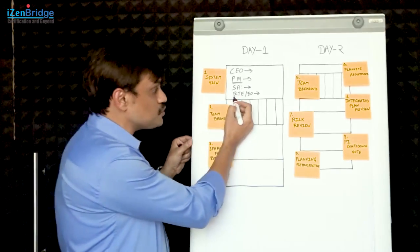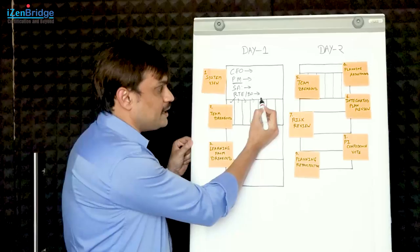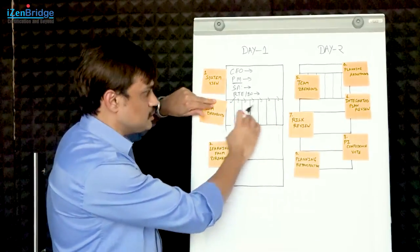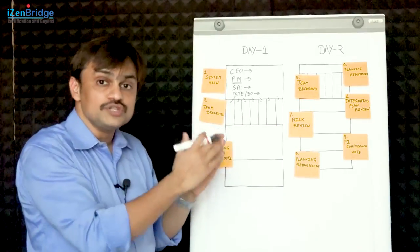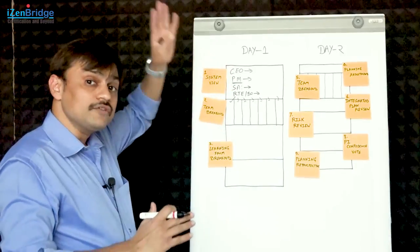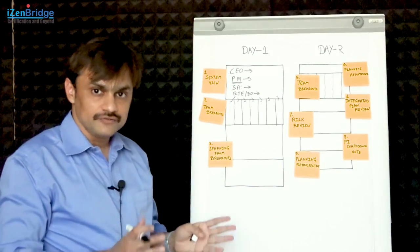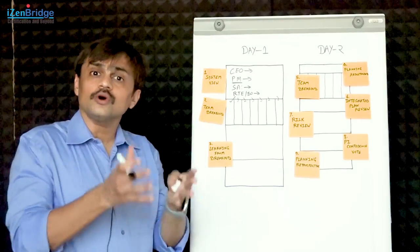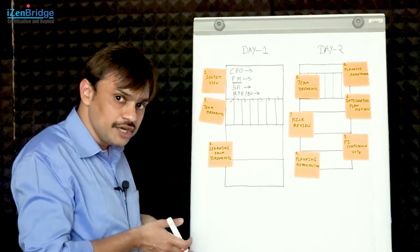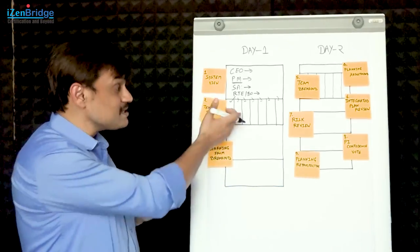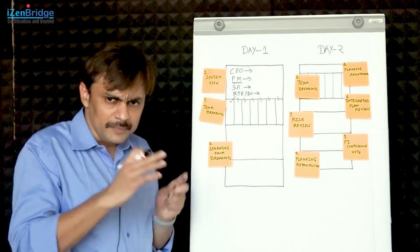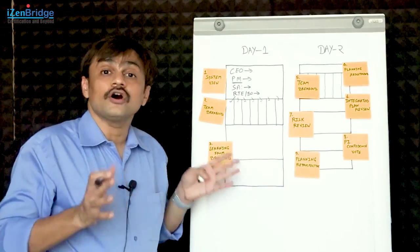Based on the discussion and our previous understanding and preparation, we had some features and now we need to work on those features by dividing them into user stories. You might have already done this at a preparatory stage, but this is the stage for user story estimation, planning, dependency management, and coming up with a plan for the upcoming PI. When I say a plan for upcoming PI - assuming I have a 10-week duration with 8 weeks of development iterations, which means 4 development iterations - I need to come up with a plan for those 4 development iterations.